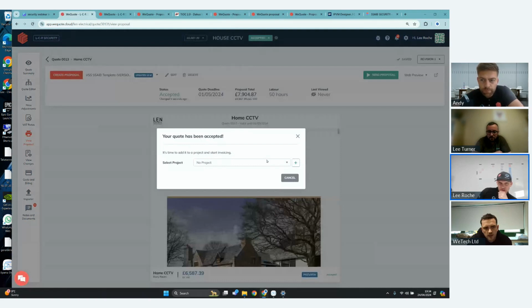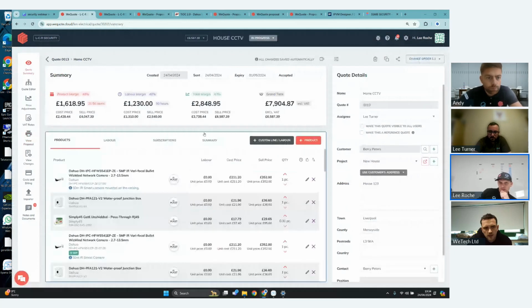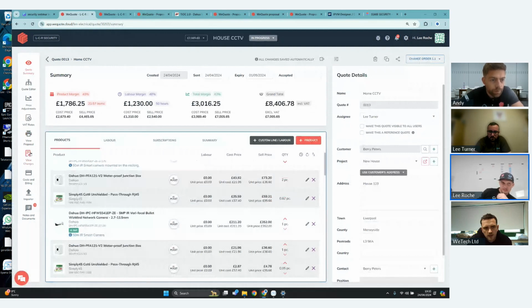So then I want to push this into a project. So I'm going to say new house project. You can give it a project then. You can assign it. So the customer has then agreed this proposal. And you can also do revisions and change orders as well, which is quite a powerful tool. So if the customer has accepted the quote, done an invoice off the platform, you can do new change orders. And then what this does is, if they tweak a quantity or move something up and down, remove things or add things, it's then tracking all those changes there.